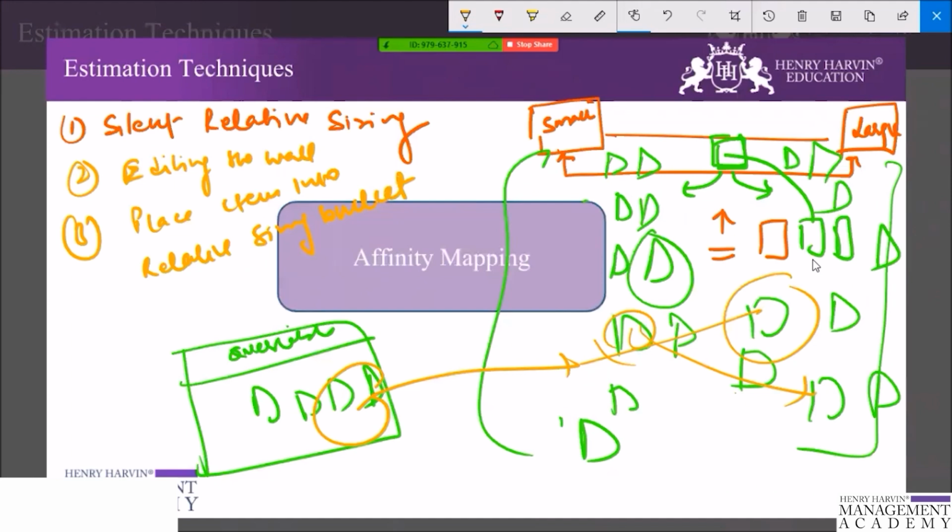So depending upon the nomenclature that the team has decided to use, place the sizes along the spectrum at the top of the wall, between smaller and larger, for instance. And if you're using the Fibonacci series for your story point nomenclature, place the 5 further away, and 3, then 2, in the form of a spectrum, and just increase spacing as size gets larger.